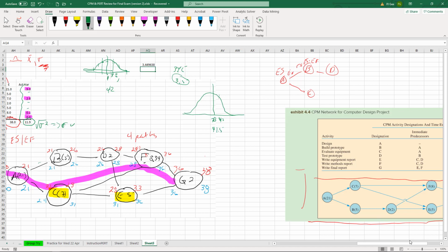41.5 is one standard deviation above, right? So 42 is a little bit beyond one standard deviation above. How much of the curve? We're going to spitball it here. If you're sitting at the conference table in a meeting, what's the probability of hitting 42?